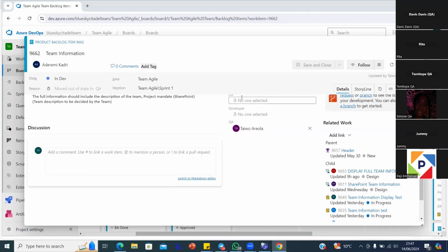Rashford told you that you need to put it in dev. I don't remember, I think you also mentioned committed. Depending on your interaction with the developer and what you think, you can decide to put them in committed because you want it to be fixed within the sprint. If it's just a minor bug and you think we don't need to fix it within the sprint, you can put it in the backlog, or put it in the approved.